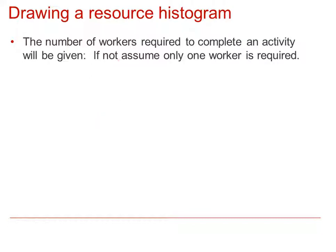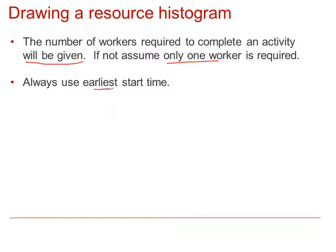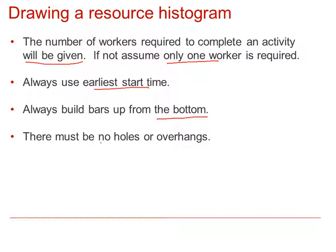To draw a resource histogram we just have to follow a few rules. The number of workers required to complete an activity will be given; if not, assume only one worker. We always use the earliest start times unless otherwise stated. We always build the bars up from the bottom. And there must never be any holes or overhangs, and this will become clear as we go through our example.